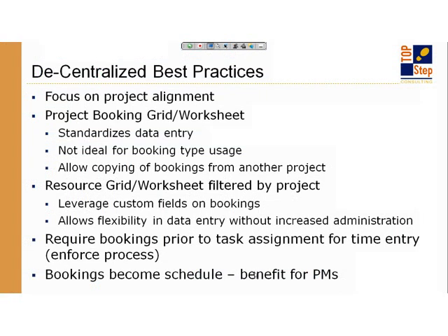If you do have a decentralized best practice in place, what ends up happening is your project managers, the main benefit for them to do resource management is that they're leveraging resource management as their schedule. Okay, so I need someone at a certain time. That's driving the timeline of when I'm expecting certain activities to happen. So to avoid overloading PMs with administration, you may decide that, yes, they can assign people to tasks, but I don't really want to maintain the dates on tasks. I'm going to leverage my resource management process to identify the schedule of work. Okay.